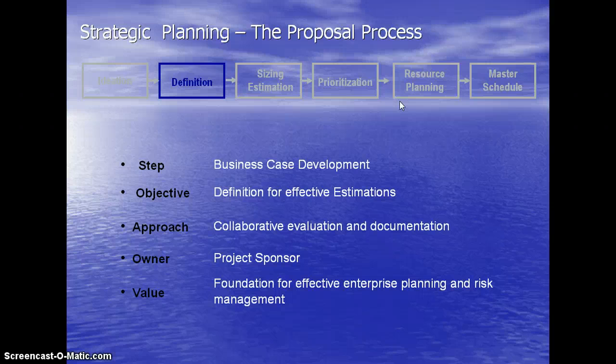Like a work breakdown structure for a project, every step in this process has a deliverable, and the process must define all of the deliverables and only the deliverables needed to deliver the project objective. The effectiveness of each step is measured by the progress and effort in the next step. The definition and management of this process provides the vehicle for continuously improving the execution of each step in subsequent passes.